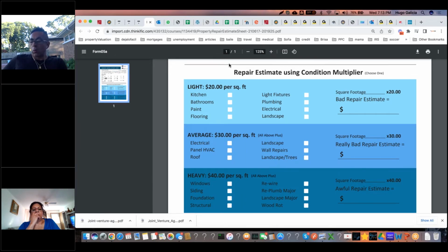Because guess what? When you get the money for the rehab from the Harmony lender, you're always in arrears. Once you complete the milestone, then you request a draw. They send an inspector, and based on the progress, they release the money. So that's how it works with Harmony lenders, and that's how you should do it with contractors.